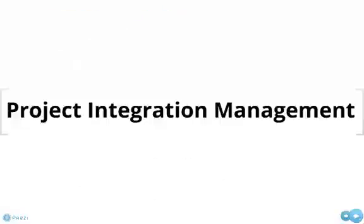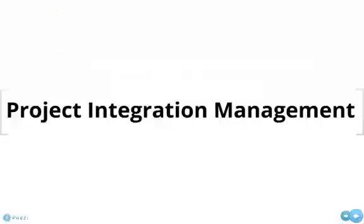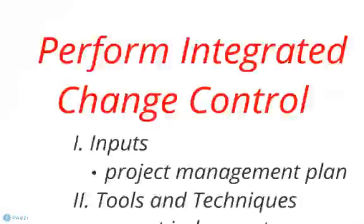In requests affecting scope, they must be submitted using scope change request forms. The project manager will meet with project sponsors to review, analyze, and make a final decision to approve or deny the request. Approved changes will be heavily communicated and monitored to avoid any confusion, reworks, delays, etc. Monitoring changes will be done by the project manager by physical inspection and oversight, along with progress reports.